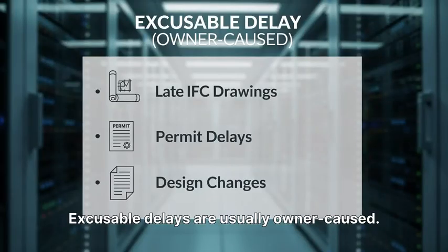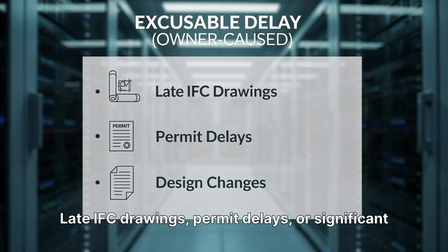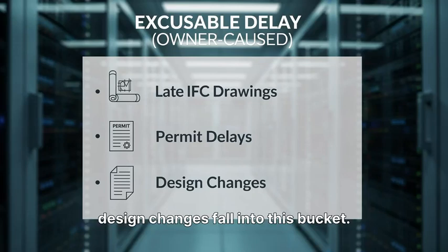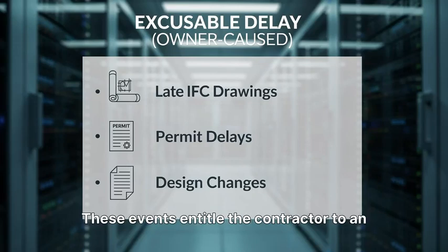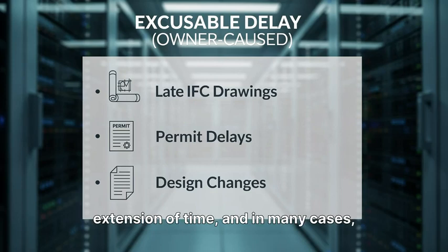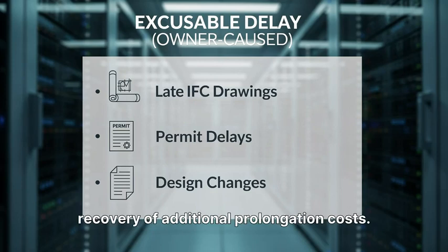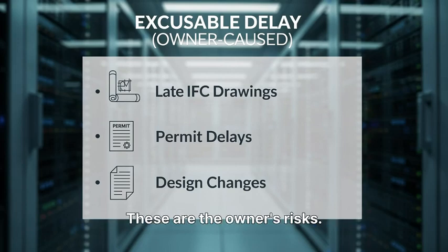Excusable delays are usually owner-caused. Late IFC drawings, permit delays, or significant design changes fall into this bucket. These events entitle the contractor to an extension of time and, in many cases, recovery of additional prolongation costs. These are the owner's risks.